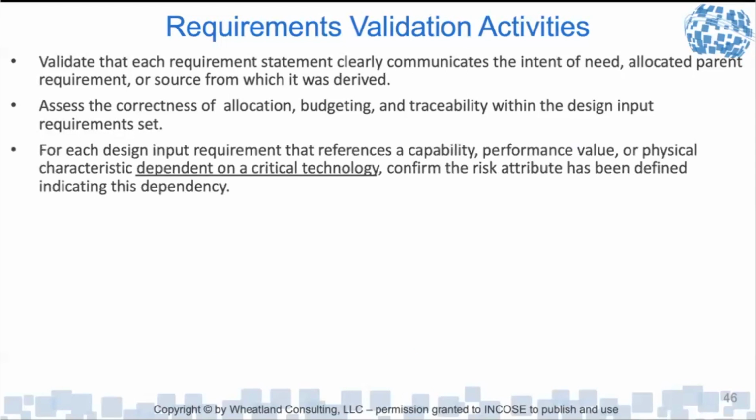For each design input requirement that represents a capability, performance value, or physical characteristic dependent on a critical technology, you need to confirm the risk attribute has been defined indicating this dependency. So if it is dependent on a critical technology and that technology is a low technology readiness level, then you have increased risk from a feasibility standpoint. And so just saying that, when you're looking at this set of requirements, you're going to baseline them. That's one of the considerations that you have.